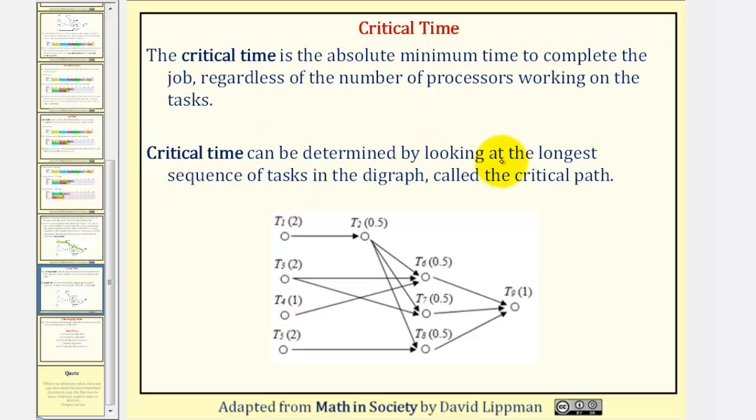Critical time can be determined by looking at the longest sequence of tasks in the digraph, called the critical path. We already pointed out that this path gives a total of four days. No other path will be longer than four days. For example, if we took this path here, notice how this would be two plus 0.5 plus one, that's 3.5. And since four is longer, four is your critical time.